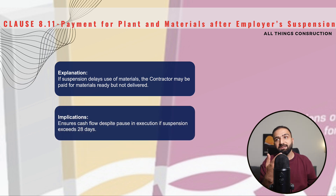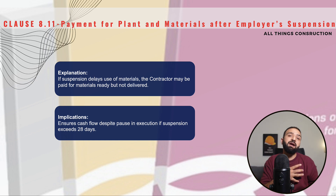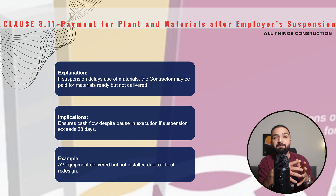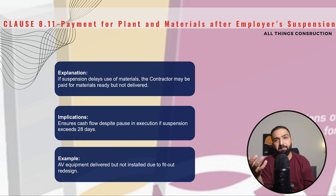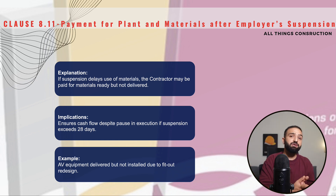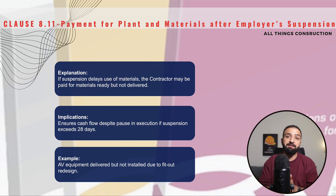What this clause basically does is continue the cash flow and save us contractors from losses. For example, we have audiovisual equipment that we have already ordered — whether delivered to site or not — and the whole fit-out design changes, as a result of which the audiovisual equipment also changes. We will be entitled to the costs incurred as a result of the previous purchase.